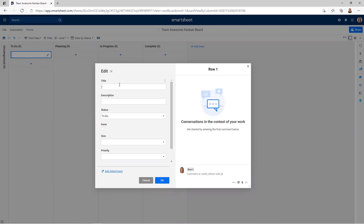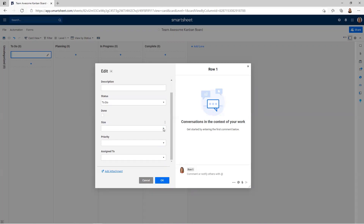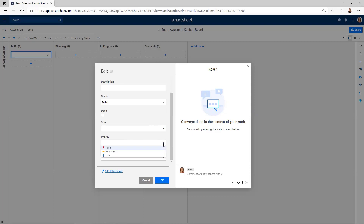So we've got the title — that'll be the name of the task — the description, and the status. The status here aligns with the different lanes or columns that you have built. We've got something called Size, which is used a lot in project management when talking about Agile projects. It gives the people on the team a general idea of whether this is a small or a really big piece of work. We've also got Priority options: High, Medium, and Low. Down at the bottom we have Assigned To. Within this form, you can also add attachments, and you can have a team chat right here. So if you want to ask someone a question related to this particular task, you can ask them in here and the history remains.